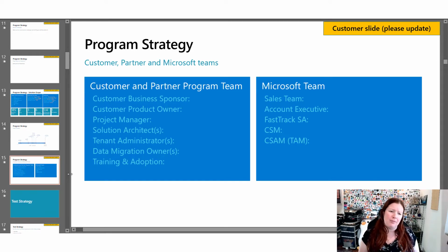If your project team is only made up of IT resources or business analysts, this will be a concern as well. This can lead to the same issues as lack of business ownership, but also introduces additional risk that requirements may not be fully understood and in the end can lead to poor user adoption.